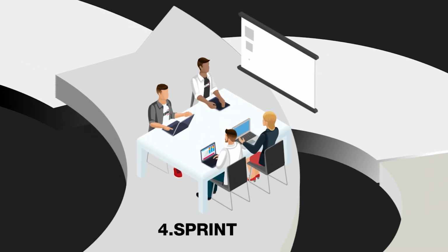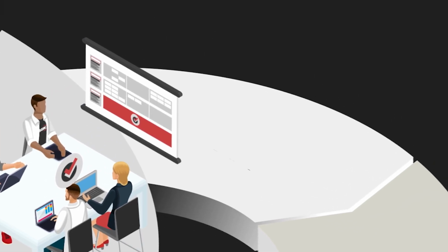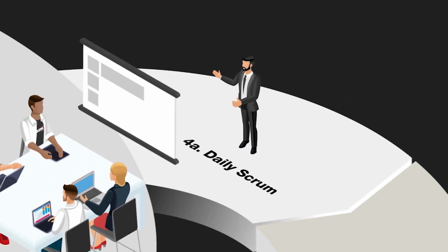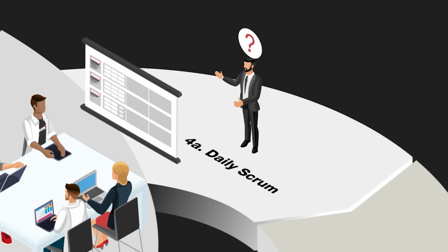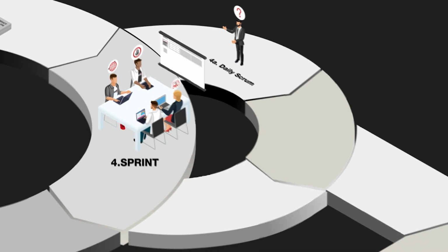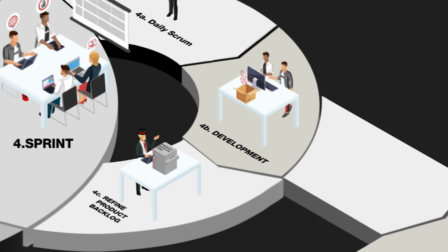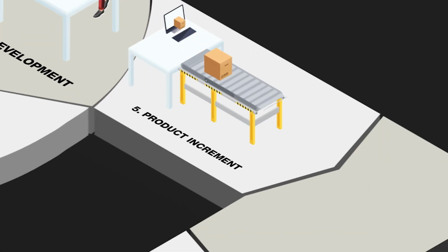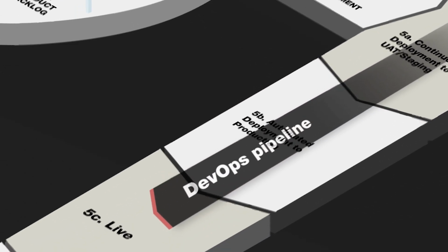During the sprint, the development team work on the PBIs in priority order and then close them once they meet the definition of done, which often includes sending done emails and done videos. Every day they do a daily scrum where they go through the task board and talk about what they did yesterday, what they're planning on doing today, and if they have any blockers. With good DevOps, multiple product increments will be shipped in each sprint.